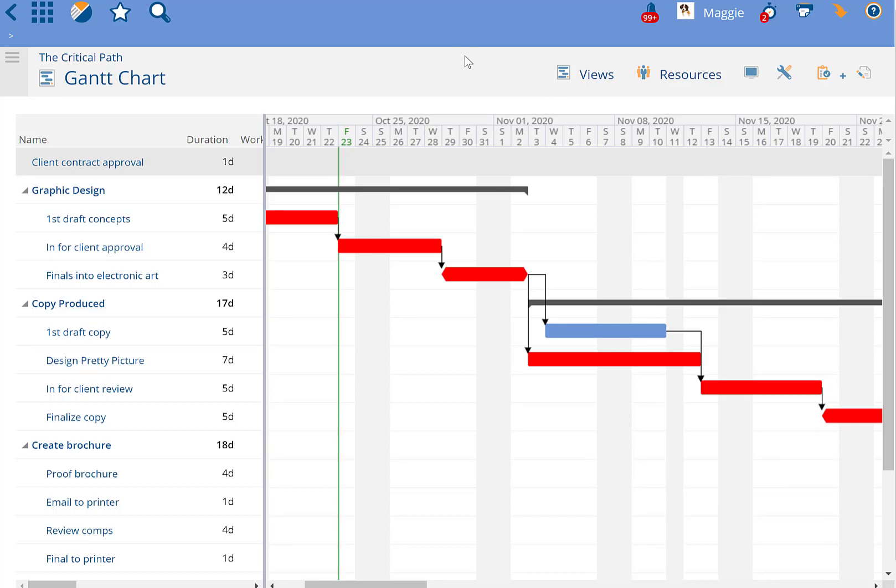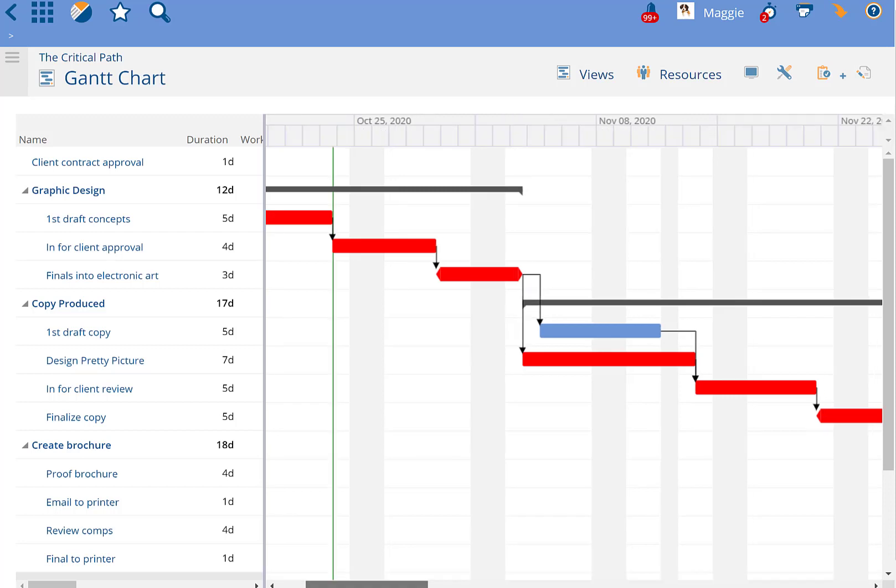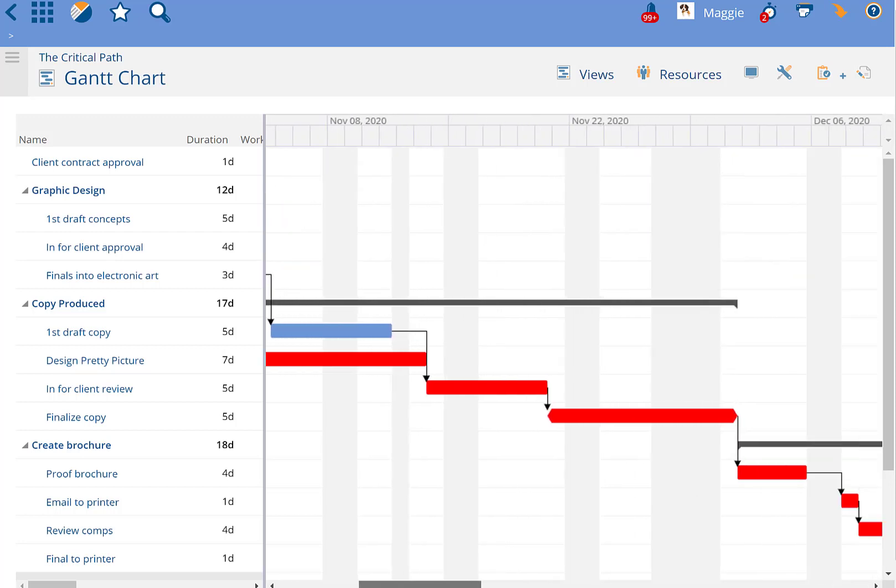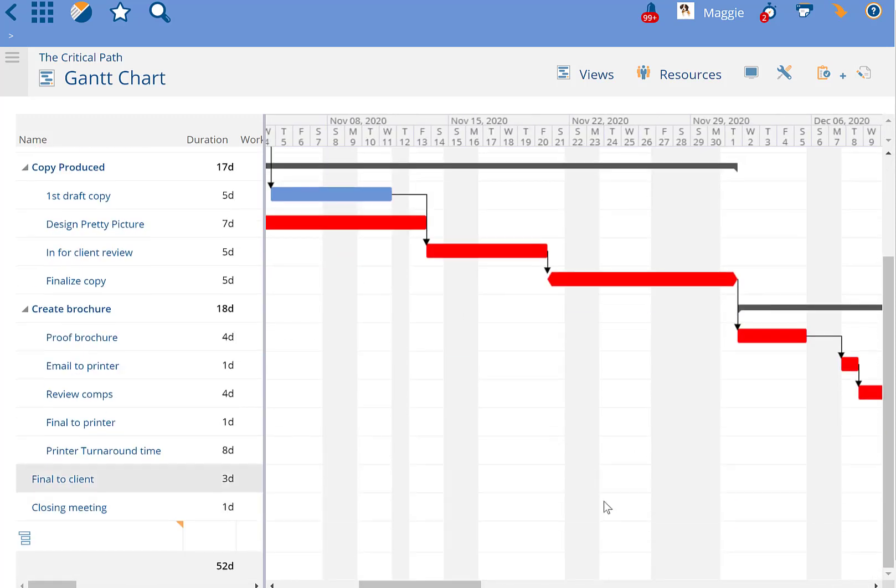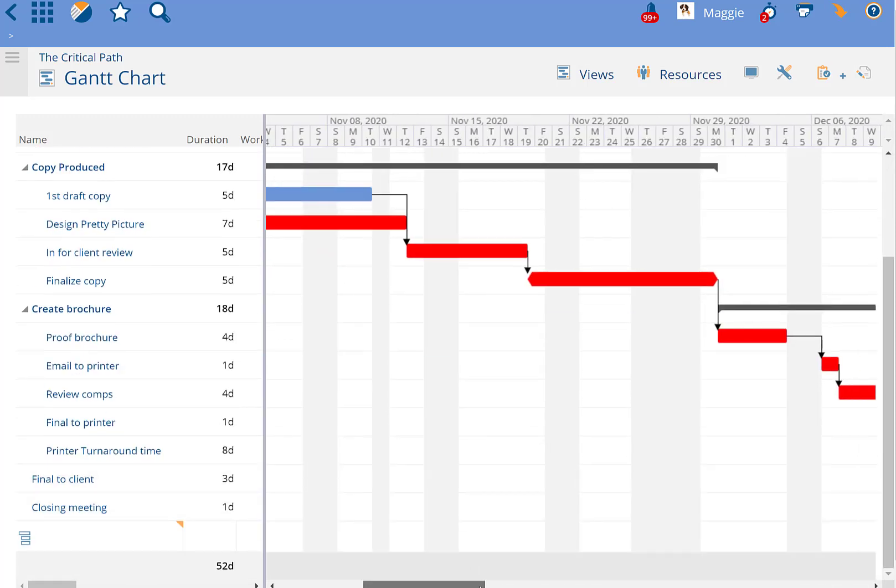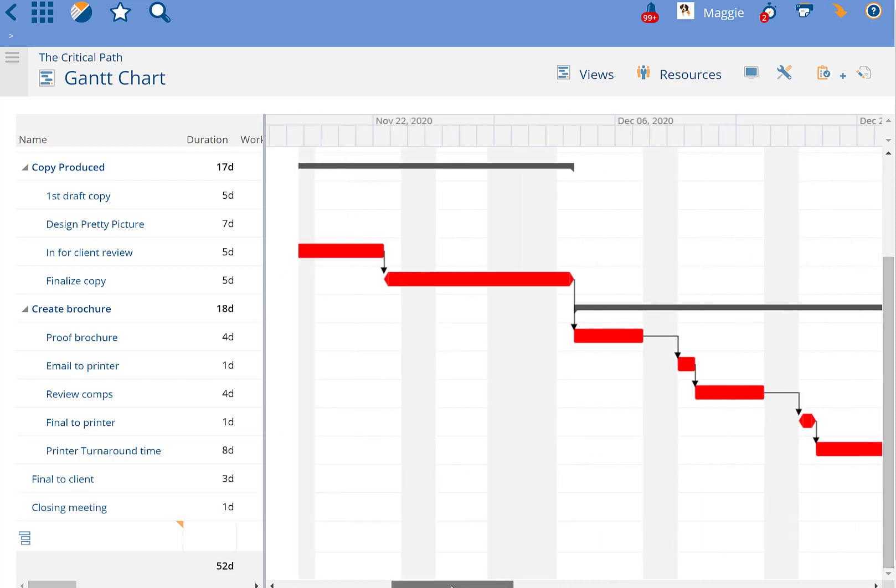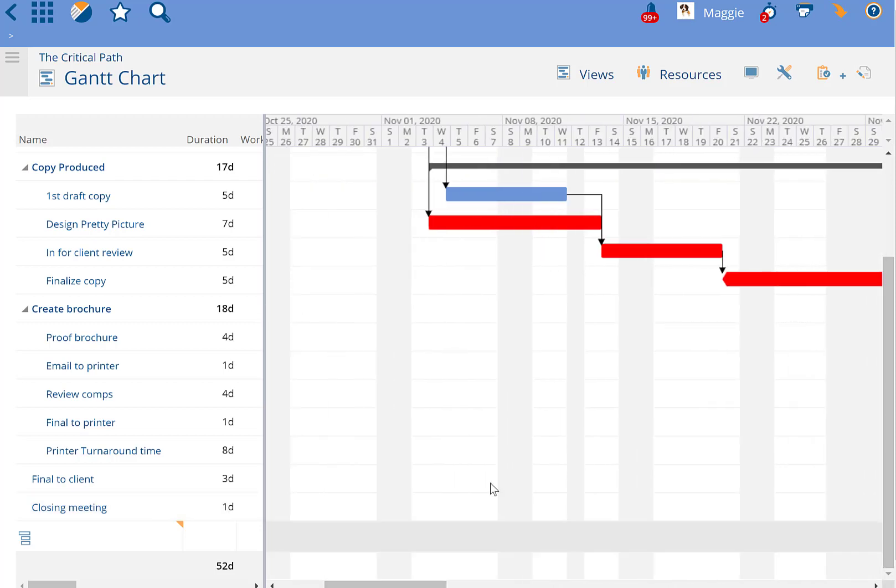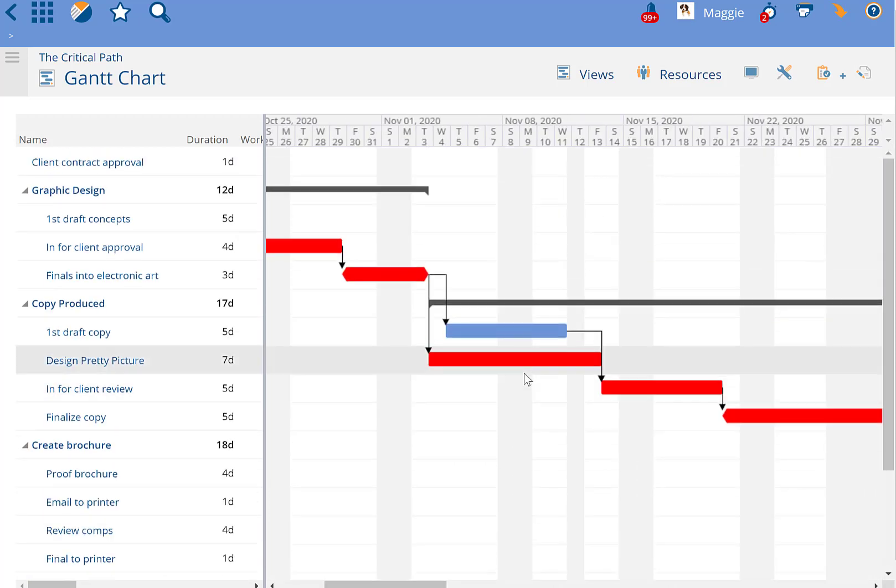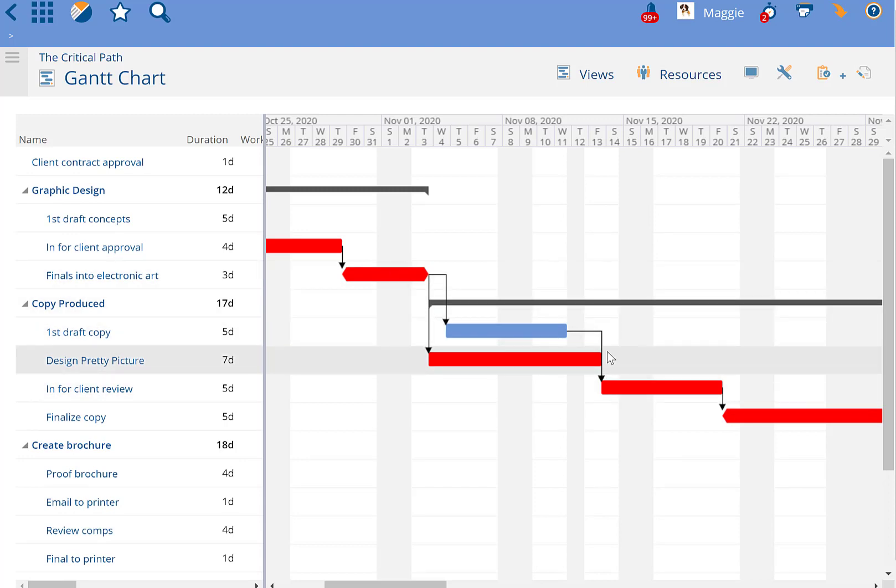This becomes very important when we start talking about complicated projects where all roads lead to one big end task. Because there'll be many tasks on the path that can move around and can float and won't affect that final end date. But the ones that are in red are the ones that if they take longer or start or finish later, will affect the end date of the project.